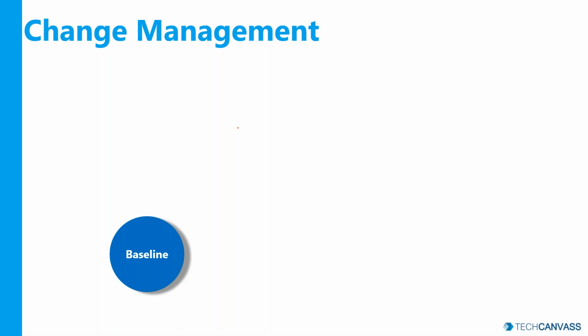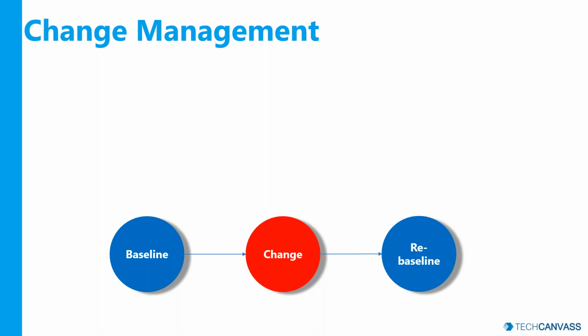Now, after you commit, there may be changes further. Let's say you are committed to deliver 100 requirements. There is every chance that the customer may modify or add 10 more requirements to that, right? So what needs to be done? In typical project management, we do something called change management. It has to undergo a change management procedure where it needs to be authorized by a set of people called the change control board. And then you rebaseline and continue with your project, right?